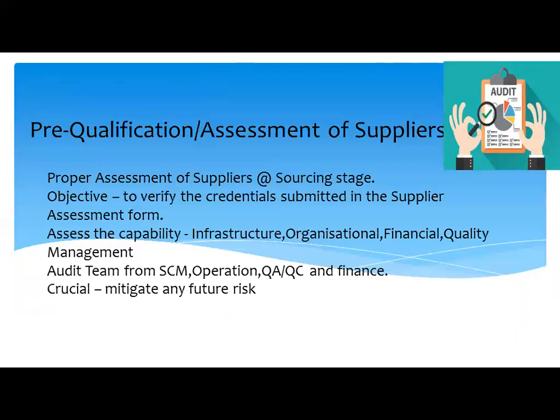Pre-qualification or assessment of suppliers. Proper assessment of strategic and bottleneck suppliers should be done at sourcing stage. Objective is to verify the credentials submitted by them in the supplier assessment form. This is to assess their capability in terms of infrastructure, organizational, financial, quality management, etc.